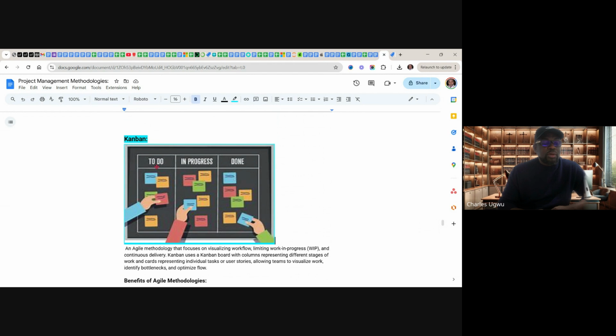This is where the sprint backlog is. You move items to in progress. And after working on the item in progress, you put it to done. So the purpose is that you can see your work visually. We started with this Kanban with cards, you see, stickers. You can use stickers on a table, on a board.